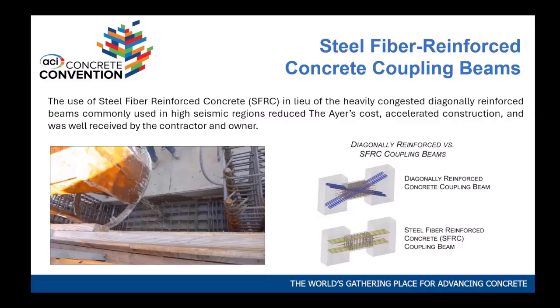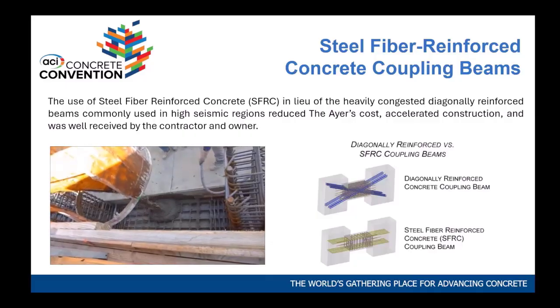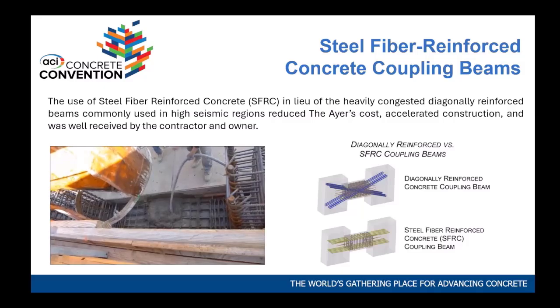And the neat thing about it, a lot of times you can pour this after the fact. What they do is they pump the wall with concrete, they bucket this with a steep bucket with fiber concrete, they vibrate it, and they put stay foam, and they keep on going with the building. Here's a video showing how that fiber concrete is put in.